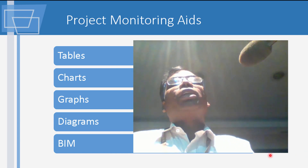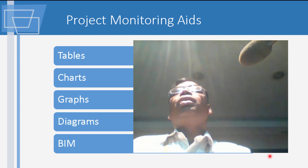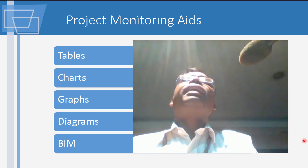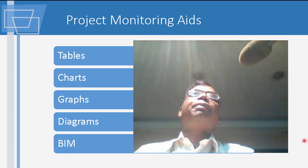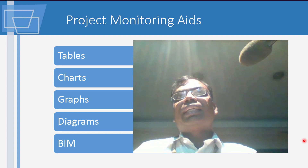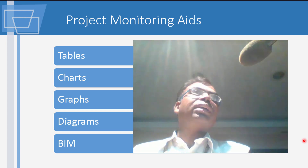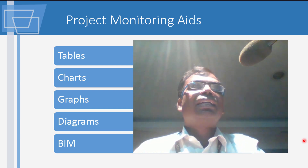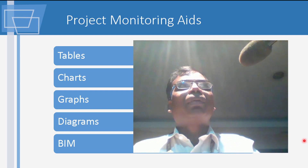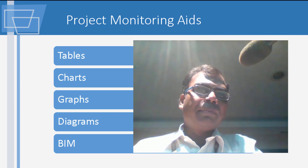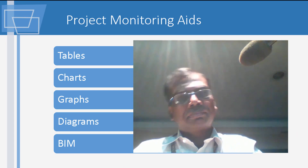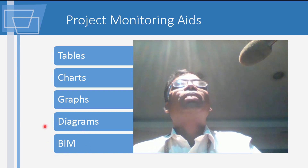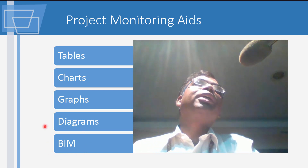These are some project monitoring aids. You've already seen the Gantt chart — you make an activity table first, then you can draw a network chart or Gantt chart, which is essentially a bar chart. The current trend is towards Building Information Modeling, or BIM.